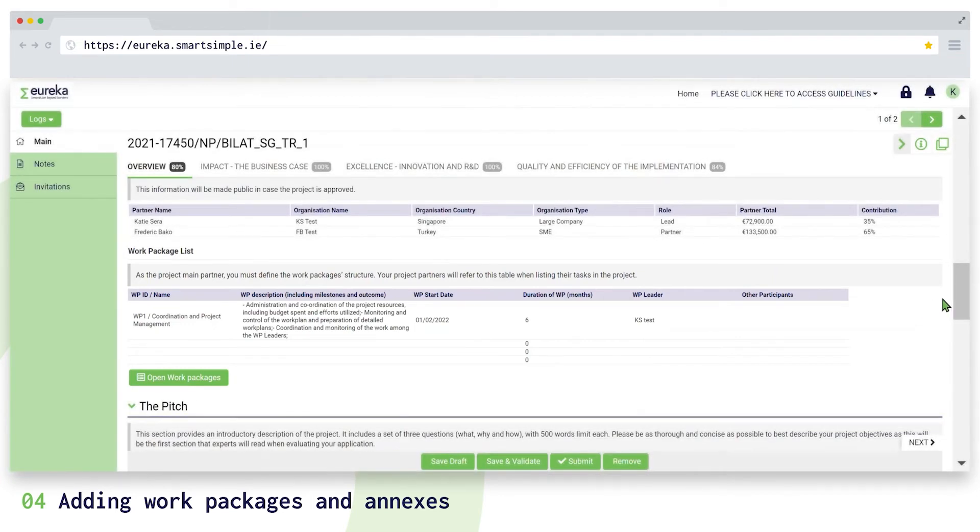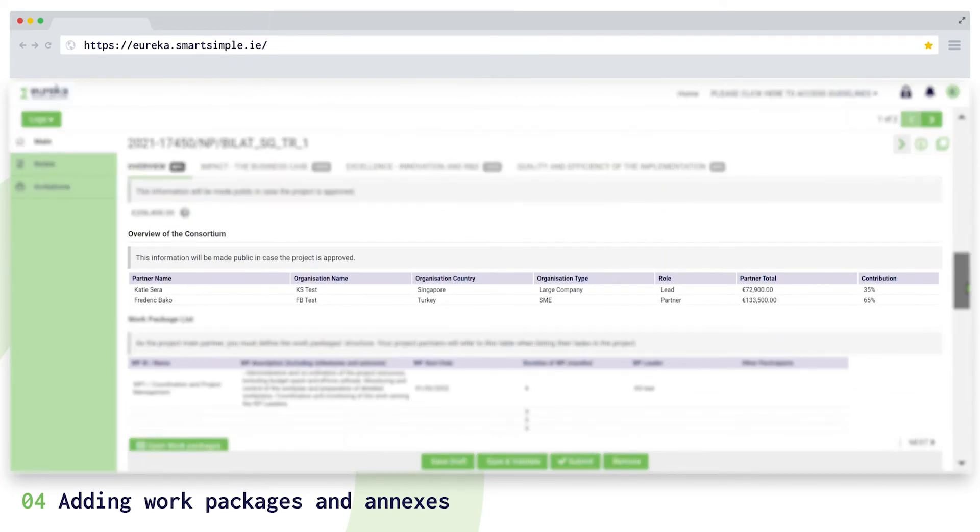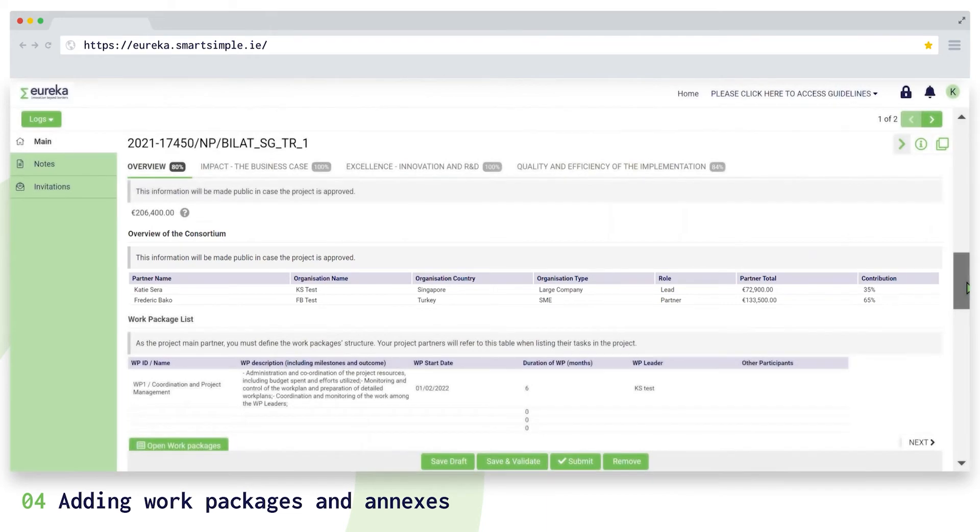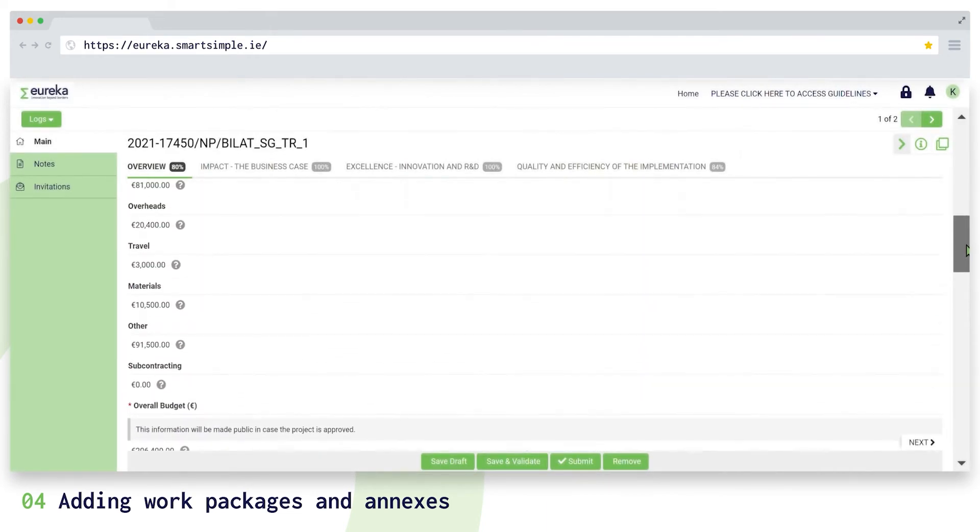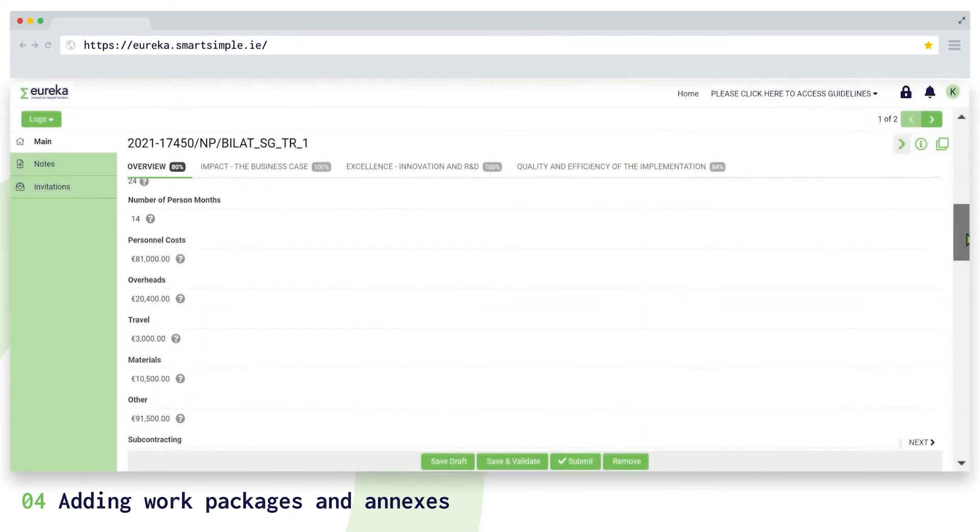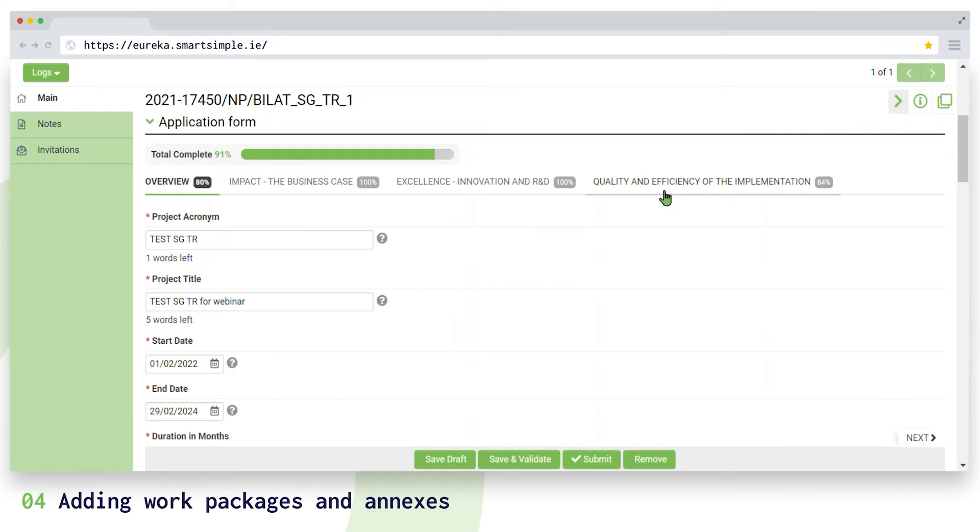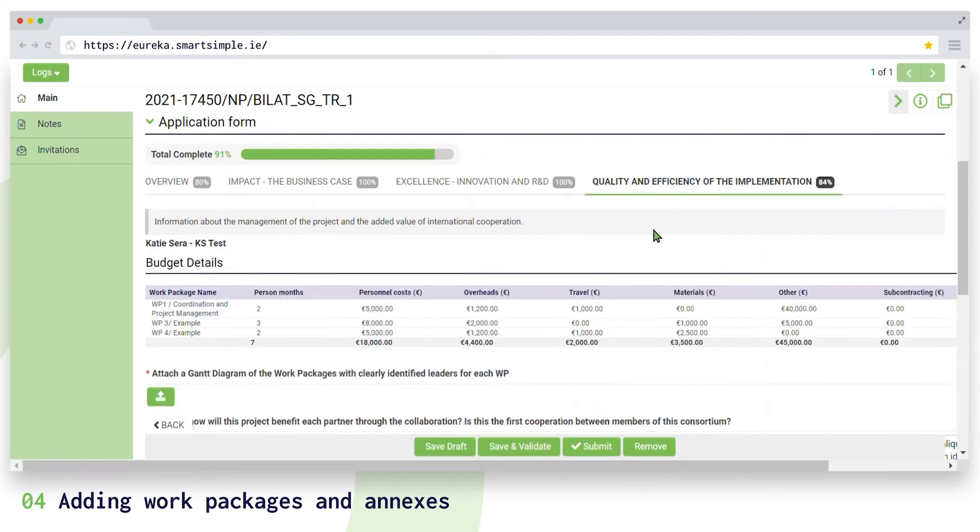Some information in the application form, like the consortium overview table or the number of person months, is filled in automatically when the partner forms are complete. Almost everything we need to know is stated in your application form, so the only document we need you to attach as an annex is a Gantt diagram. The main partner uploads this in the quality and efficiency of the implementation section.